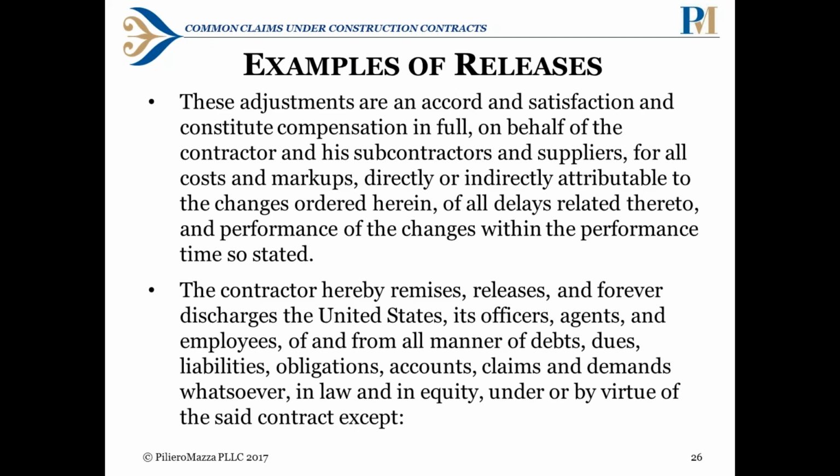So here we have a couple examples of releases that you might come across similar language to this. The first one shows these adjustments are in accord and satisfaction and constitute compensation in full on behalf of the contractor and his subcontractors and suppliers for all costs and markups directly or indirectly attributable to the changes ordered herein, of all delays related thereto, and performance of the changes within the performance time so stated, which gives up your right to go after these costs.